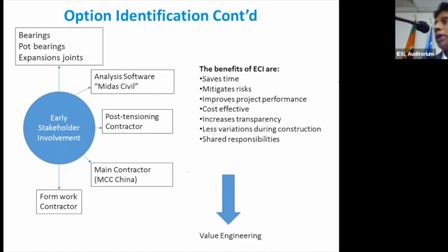There's a huge cost penalty if you don't do it right. Especially the time constraint is very tough, because if you slip off that target, this is one of the busiest motorways in UK, and the Highways Agency, the equivalent of RDA, puts huge penalties. So they wanted to finish this in time. The idea was we had to sit down with the contractor and come up with cost-effective, efficient, constructible structures. So that had happened.